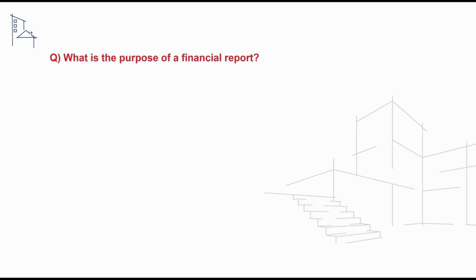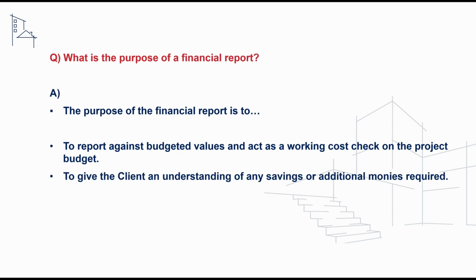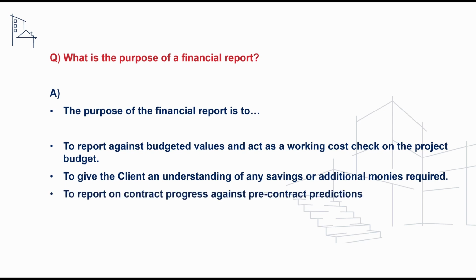payments. We may also be asked a question on our knowledge of the purpose of a financial report, and to address this we can say that this is to report against budgeted values and act as a working cost check on the project budget. It's also there to provide the client with an understanding of any savings or additional monies required, and it's also there to report on contract progress against pre-contract predictions.